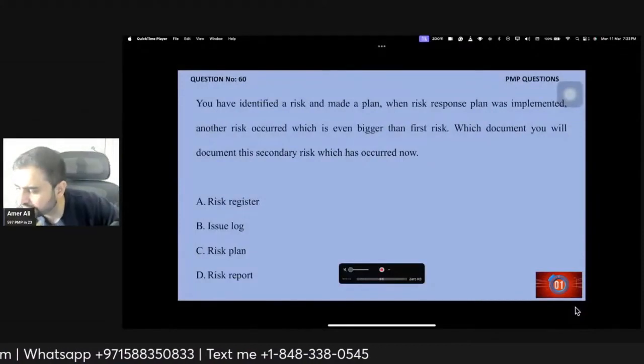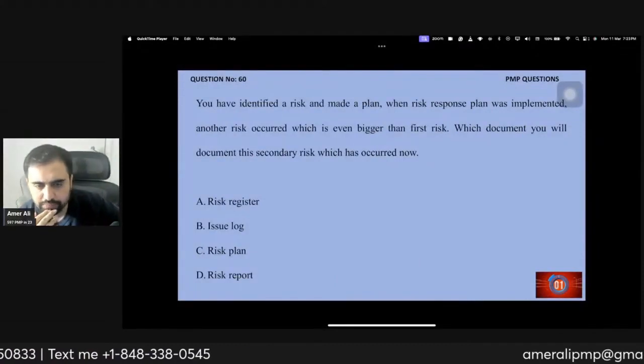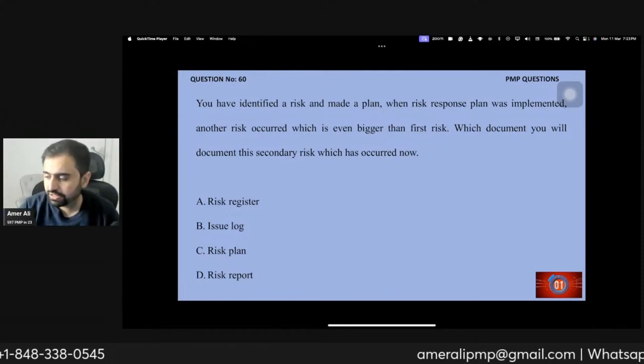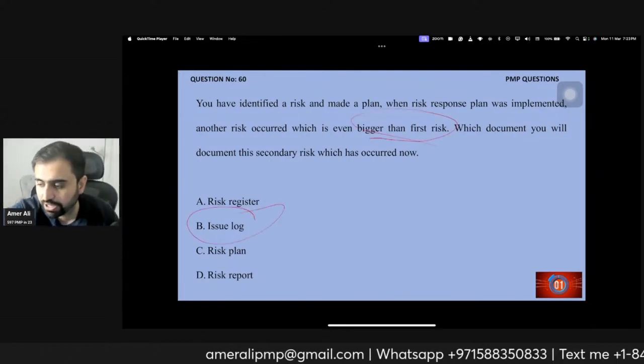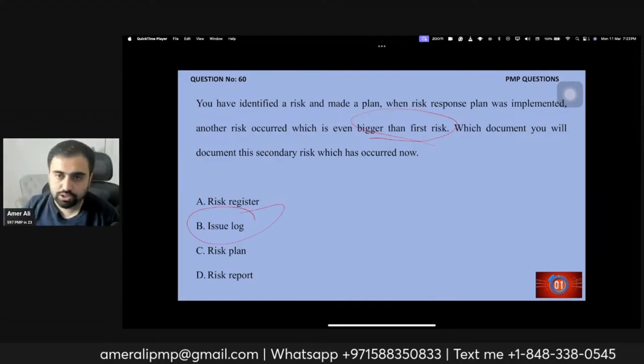You have identified a risk, made a plan. When the risk response was implemented, another risk occurred which is bigger than that. So you don't have a plan for something. We discuss: if you don't have a plan, that thing straight goes to the issue log.